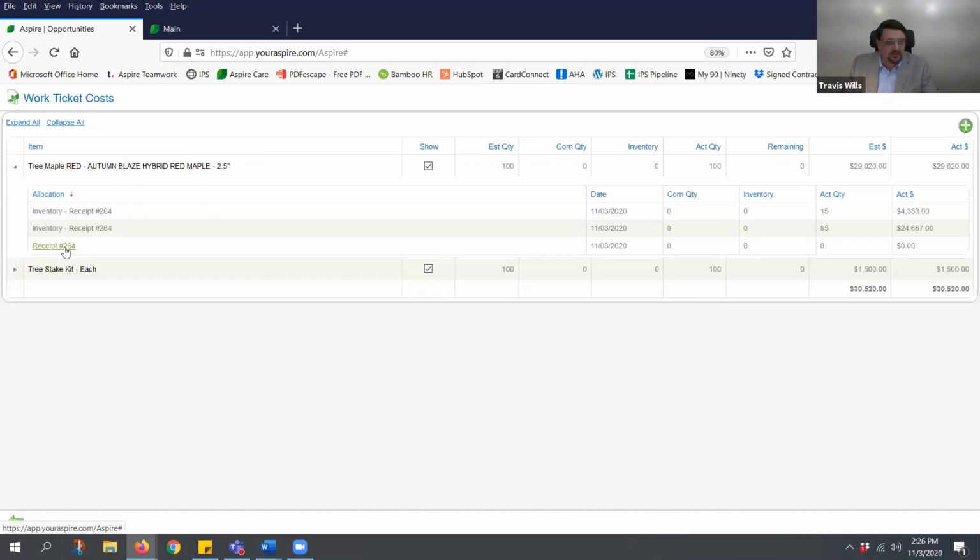I do think it's a great tool to be able to spread the costing of those materials, particularly for a lot of large materials. You get a lot for tree installs where you can delay the application of the cost so that you can more accurately track where you're at in the installation of the project as opposed to just accepting the cost.